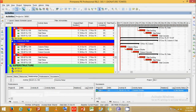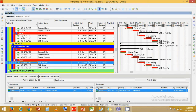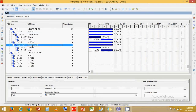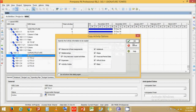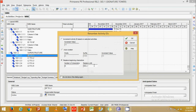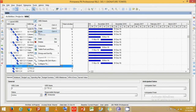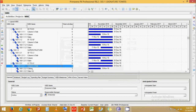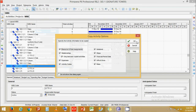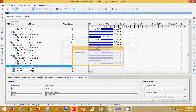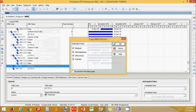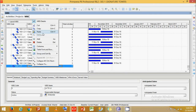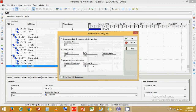Coming back to activities, you'll now see activities for Ground Floor have been created. We now have SIG B1 Level Slab and SIG Ground Floor Level Slab for the 5 levels. Go to WBS level, click Copy, then Paste, click OK, press L1 — it is done. Repeat for L2, L3, L4, and L5 by clicking at each level, pasting, and confirming.